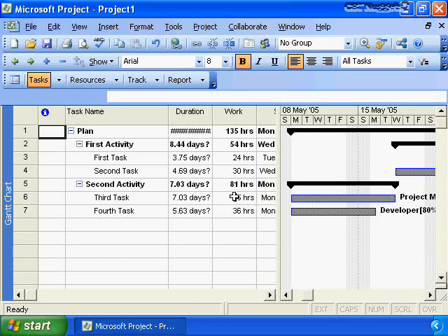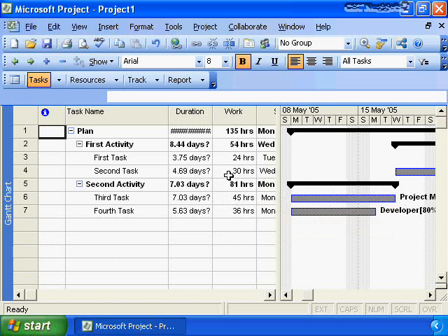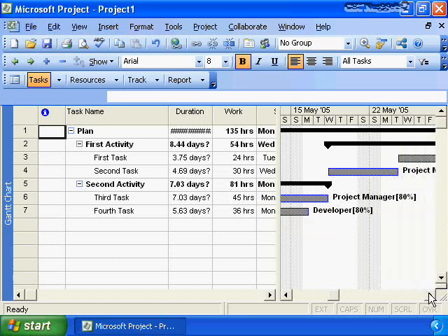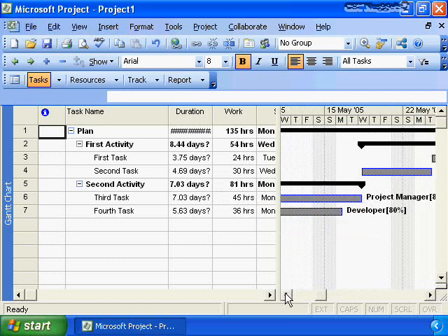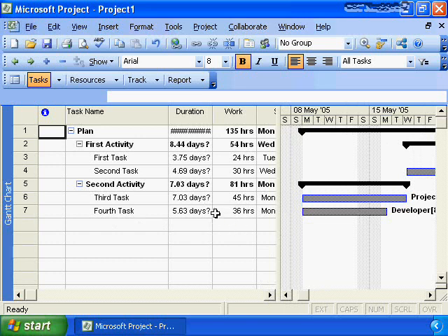It has 45 hours of estimate on it, so therefore I'm going to schedule that first, get it out of the way so we can go on and do other project tasks, and then I'm going to look for your next hardest piece of work, which is this one at 30 hours, and then finally the remaining task at 24 hours. So that's why it did this rather unique approach to scheduling, and it did the same for our developer, where the developer only had the single task, so it simply allowed the developer to start working on that first task right away on our project.